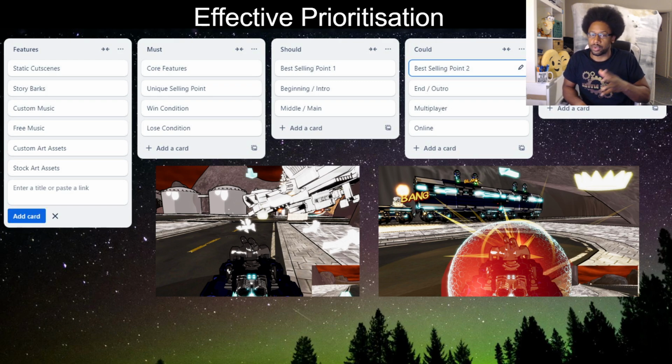Something else on your could or should list has to be downgraded for something on your won't list to get upgraded. So you're giving them the power to make that decision. Another thing about that is, if you do add things from your won't list, it sets a bad precedent, because now your employer will think, okay, he can do it. So on a future project, if you say you can't do something, instead of them respecting your decision, they're going to assume you're going to do it anyway, or they're going to think you've underestimated it. And that puts you in a bad spot.